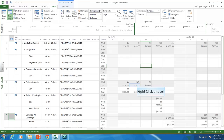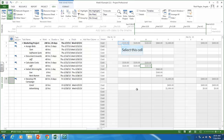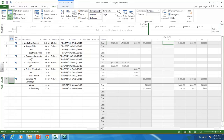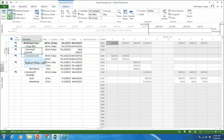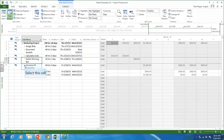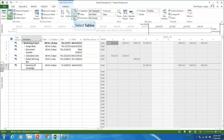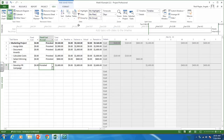You can see the default view shows hours. We want to create a time phase budget showing cost, so right-click and click Cost. Now we see hours and cost. Right-click again and uncheck Work because we just want to see costs. This is our time phase budget. You'll also want to collapse each task so you don't see the individual resources, and make sure your table is set to the Cost table in the Task Usage view showing cost only.